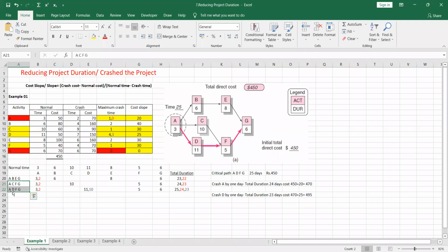And C and D is there. For the C, we have to incur a cost slope of 30. For the D, we have to incur a cost of 25. So if we are going to separately crash this activity C and D both, that means the cost of these two C and D is totaling up to 55. The sum is 55. But the cost is higher for that, 55 is higher. We can simply crash the activity F. Activity F එකේ cost slope එක කීයද පුතේ? 30යි.